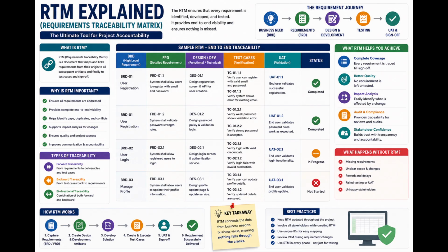RTM explained, Requirements Traceability Matrix. Discover the ultimate tool for project accountability. We explain how the RTM links requirements from their origin in the BRD, through design and development, all the way to testing, ensuring that no requirement is forgotten or missed during execution.